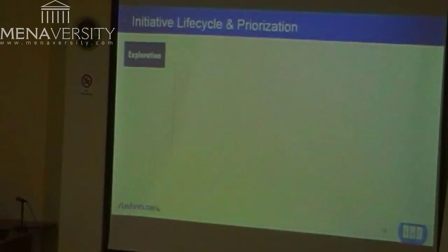So next job, we first redefined what we mean by projects. They don't all have the same level of granularity, and they don't have the same level of follow-up. We're not going to create bureaucracy for an evolution that costs 2 days to change the color of a button on a page. Typically, it's useless. It's going to cost more to talk about it than to do it. So this is applicable for strategic initiatives and local initiatives only.